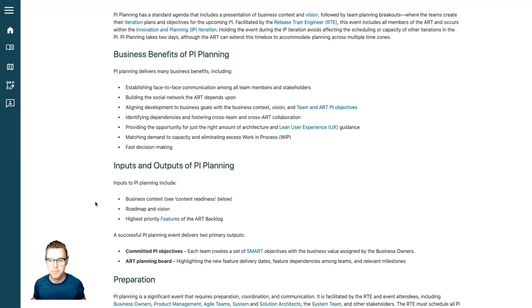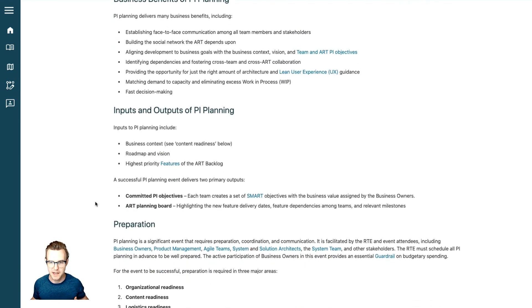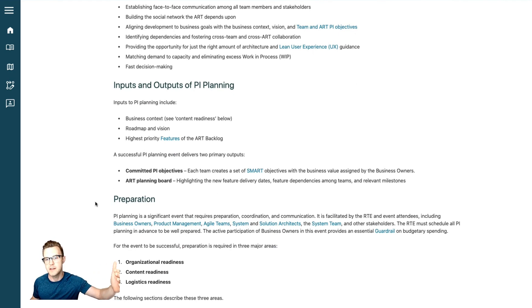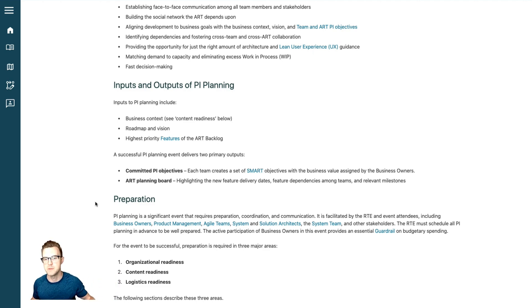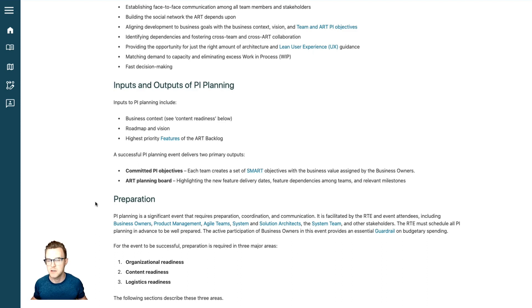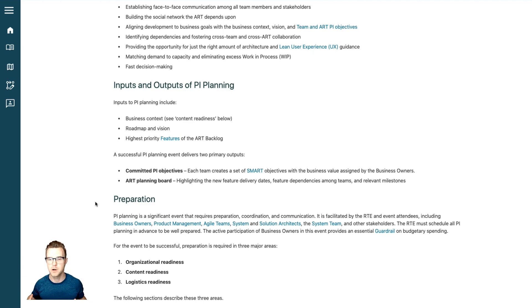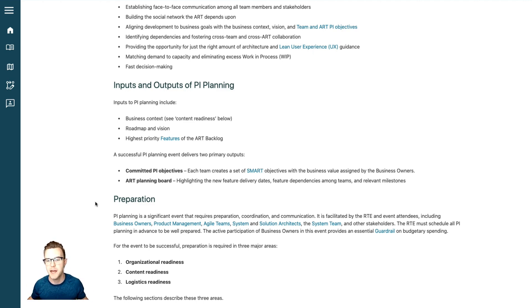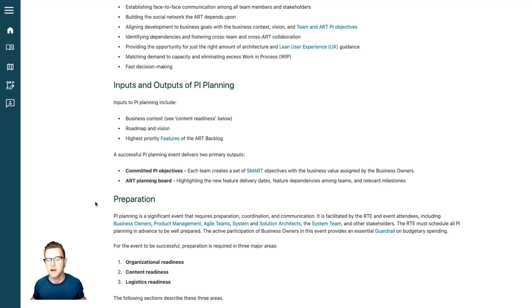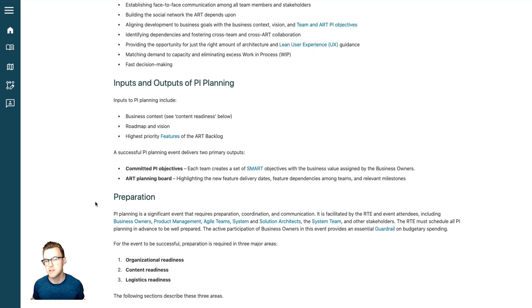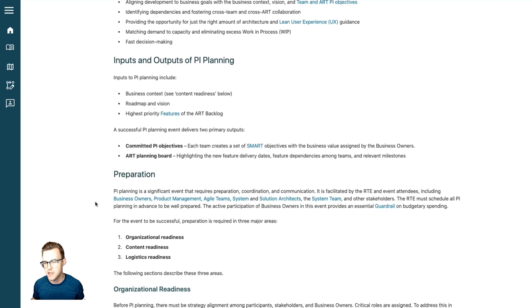So the inputs of this is the business context. Starting from a high level—VP, director, even higher business owners—that's where input of this meeting comes from. And also maybe a high level roadmap and vision and maybe the highest priority from the customer features that are in the next time box, whether it's one, two, three months. And that's where the team goes and actually breaks those down and says, this is our plan on some kind of visualization board. And this is what our objectives are to complete in this next time segment based on all the factors that we discuss together.